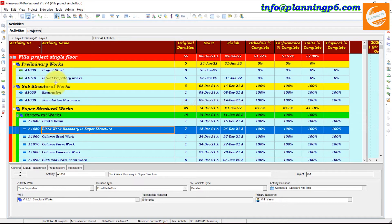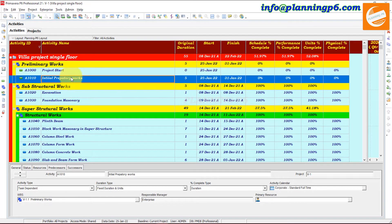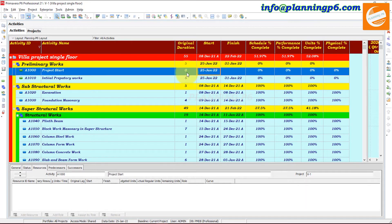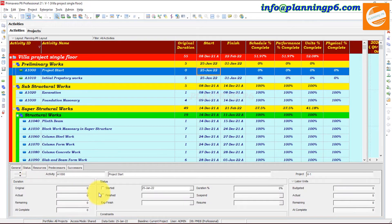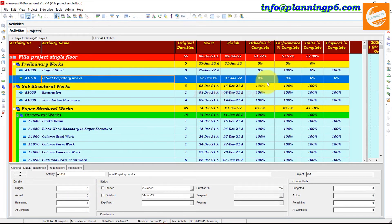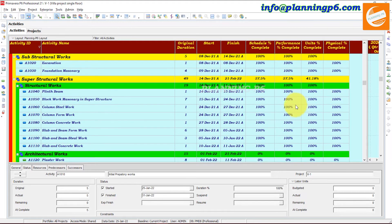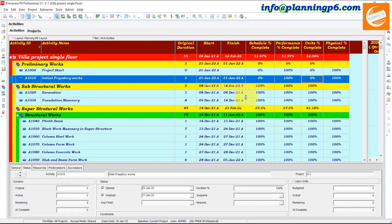Only the project milestone is not updated, and this activity has no resources — that is why this activity is also not updated. We have to apply actuals for these manually. First, we will complete this activity: Status > Started > Complete. This activity also we have to complete because there are no resources for it. We will update this activity as planned. Units is zero because there are no units.